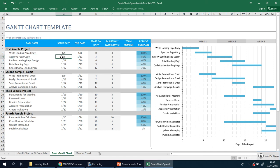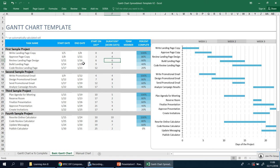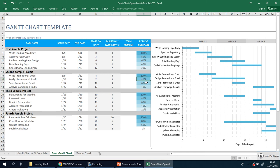Then you say the next task, when is that going to be started, when is that going to finish. That's going to start on what day? Well think about it. If this is a four day task, I'm not sure why it says three there, but it will be the third or fourth day basically. And again you say the duration, how many days. You can see the next one continues on from that, so the one after that starts on the day that finishes and it's going to finish on that day because it's going to take six days to complete. The percentages you just basically fill in to say how many have been completed by when, but I won't worry about the percentages because I don't think you need to do that.